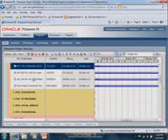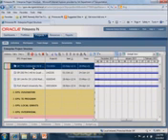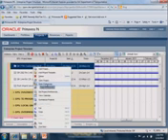To open a project, you would just pick whatever project you want. A couple of different things you can do. You can right-click and say Open Project. You'll notice there is another option here that's Open Exclusively, which basically, if you open a project exclusively, it means nobody else will be able to update that project while you have it opened in exclusive mode.